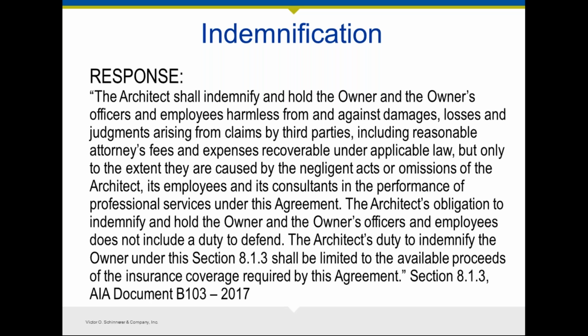One last thing I want to say about indemnity is that a lot of times what you're faced with is a broad defense and indemnity obligation from your client, and they're actually designed to respond to claims that would be covered by other insurance policies, such as the commercial general liability. That indeed does have defense rights to the owner if it's an insured contract. And so it's oftentimes difficult to negotiate because the client says, well, wait a minute, you have insurance.